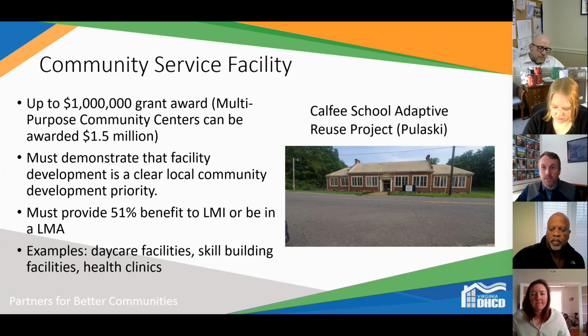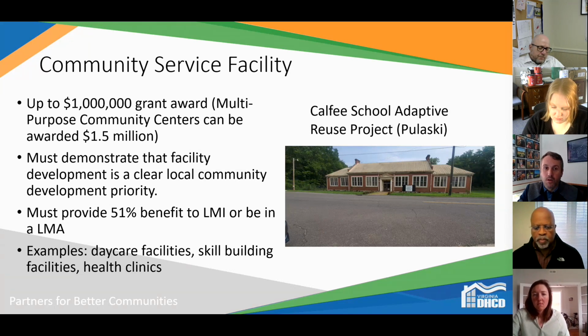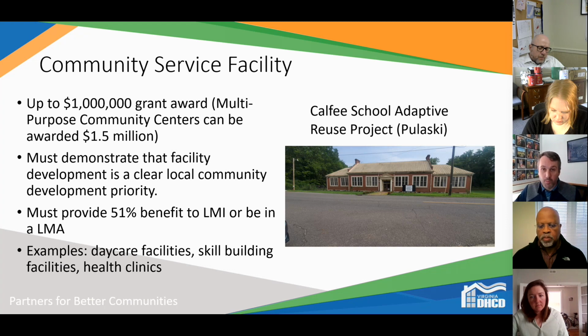And then, Jennifer asking about, can the LMI status be determined with the planning grant? Absolutely, that's a great use of planning grants, not just to determine the LMI status, but also participation rates and structure, get people involved, have community meetings where you can describe the project, get information or input on how to build out the project. Planning grants are a great resource to develop any of these project types, but several of them are really geared toward getting community buy-in to help you build out the project, which will help build a solid application.